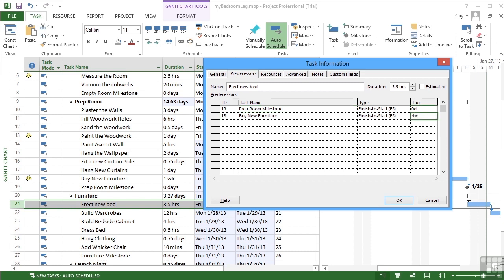In this case, it's not four elapsed weeks. It's actually four weeks because it takes four working weeks to get the furniture made and delivered. If there happens to be weekends and bank holidays in between, then that will physically take a lot longer. So it's not elapsed time in this case. So that's 4 W.